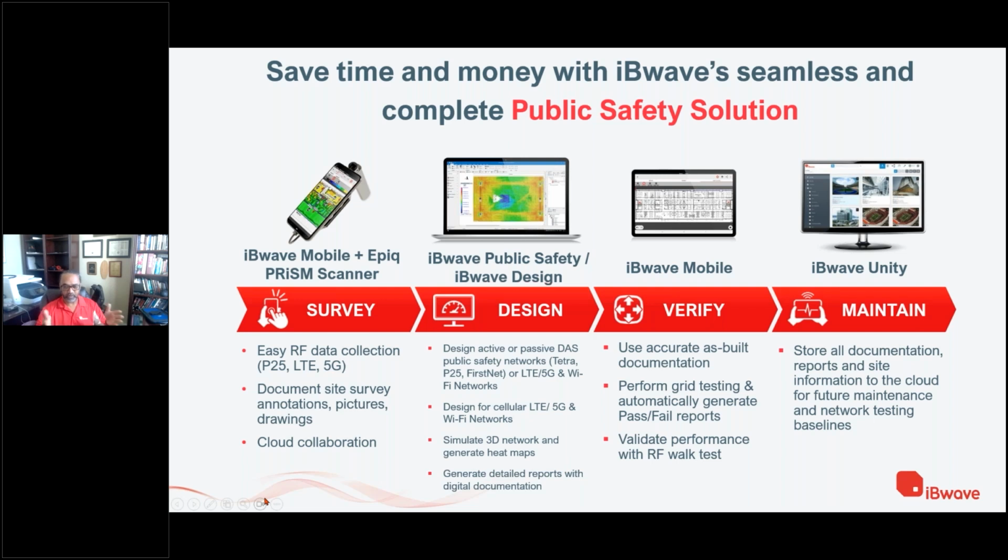You can search the product, like how many times I used XYZ product, and how many buildings you have done a certain way. For example, I have 100 projects. How many of them were hotels? It'll tell you 10 projects were hotels. How much did they cost per square foot? So you can do a lot of intelligence on the data up there. So it's not only a repository system, it allows you to use the data in a useful format.